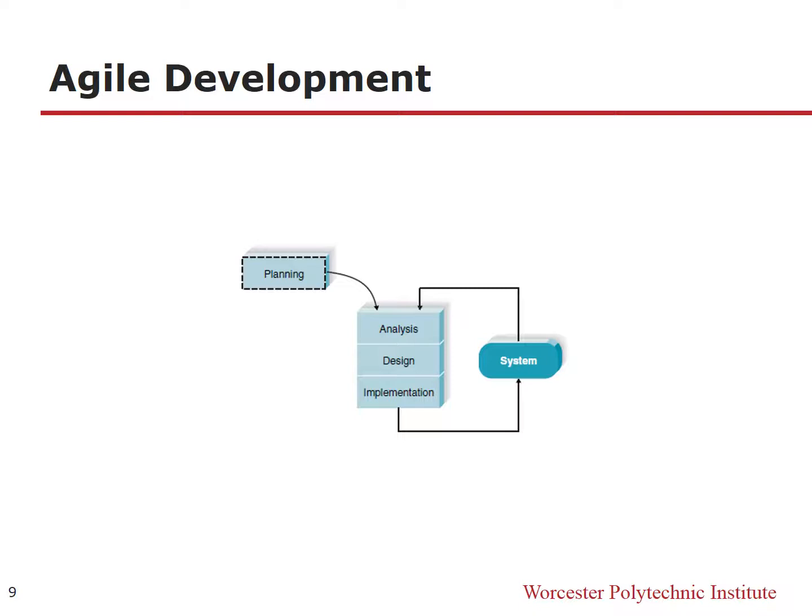The fast pace: because you have to output the complete version of the system in the first iteration, it must be under fast-paced development. But the fast pace is not a solution for a big product. So the agile development just fits small or medium projects.